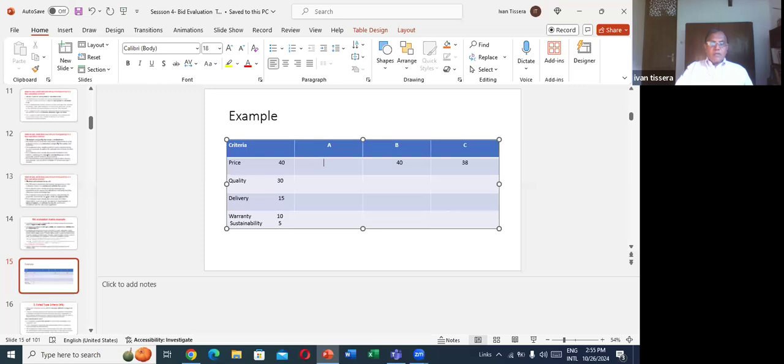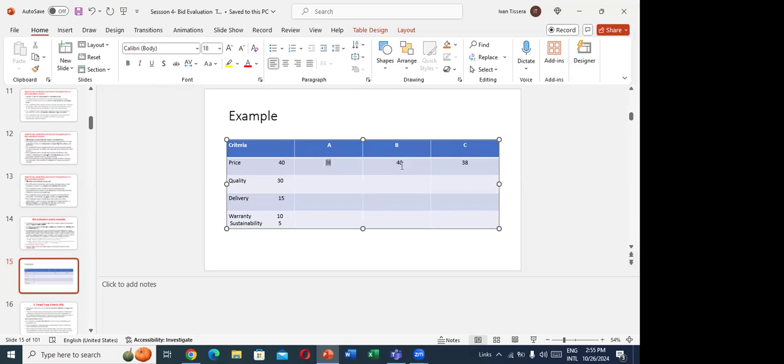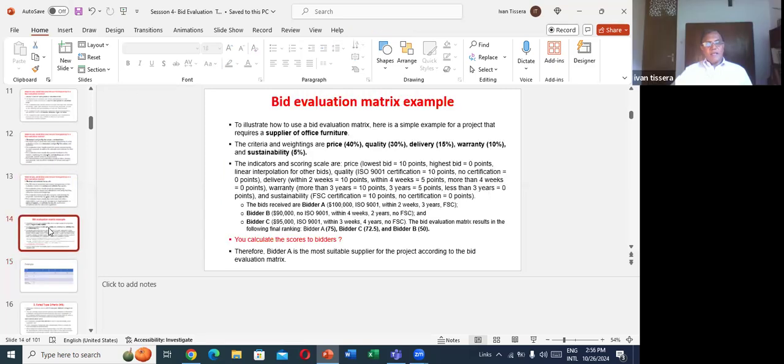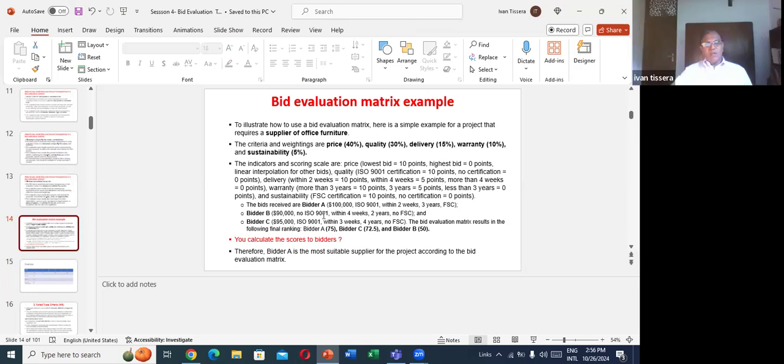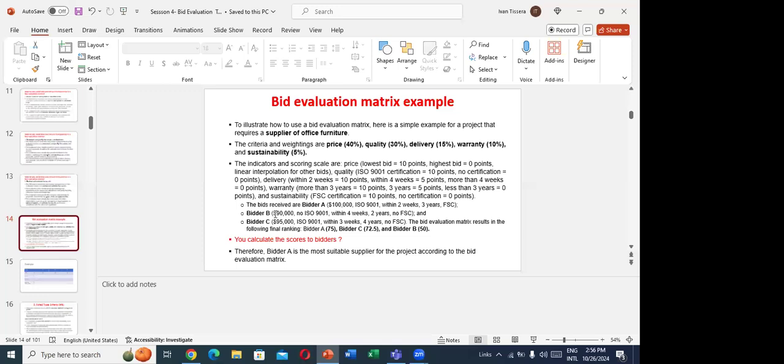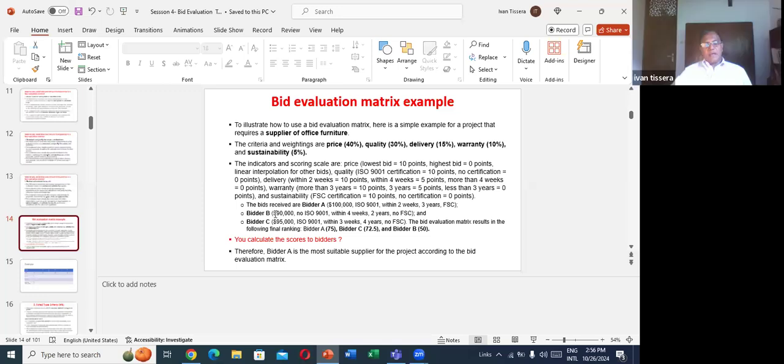Do you know how we calculate that? Sir, can you go back to the question? Go back to the previous line, please. This one. So out of 40, A's price is 100,000, lowest is 90,000. So 100,000 means 40%? No. Lowest man get the highest marks. Oh, you're putting the price. Okay. Yeah, 90,000 man get the, what we have to do is, you put 40 marks